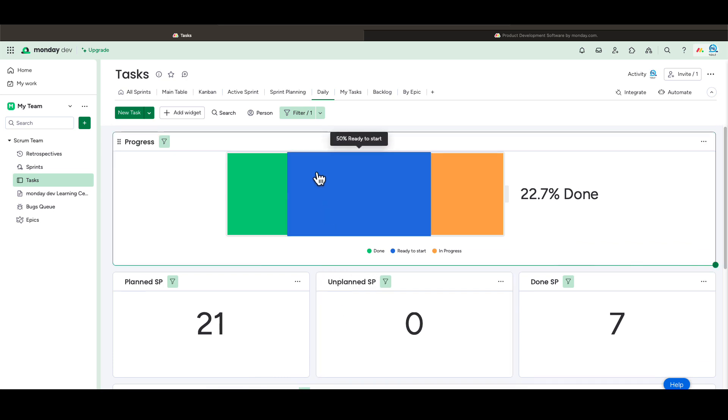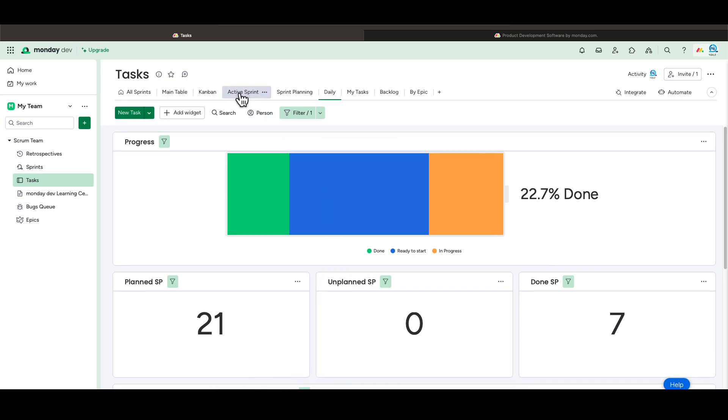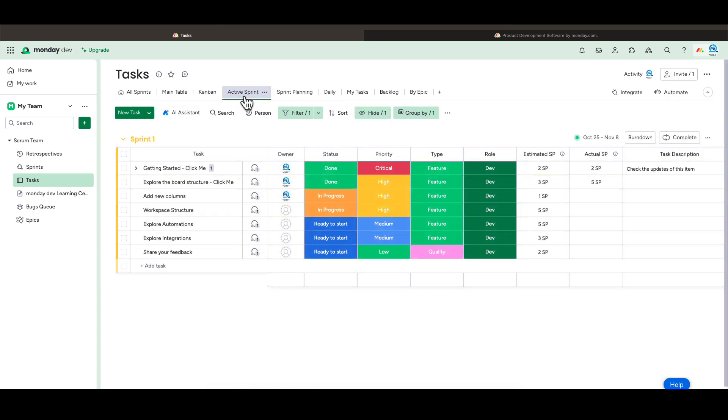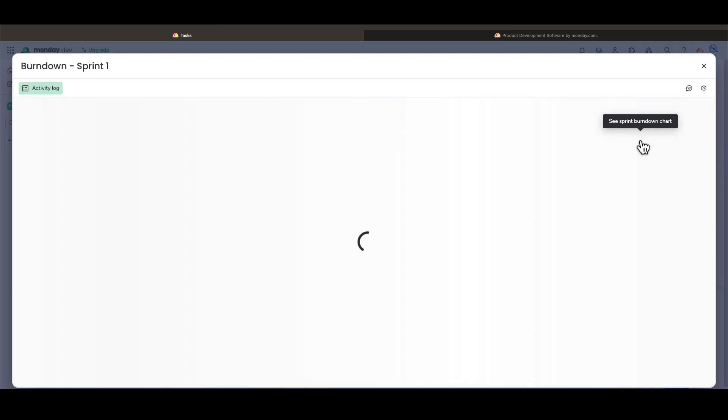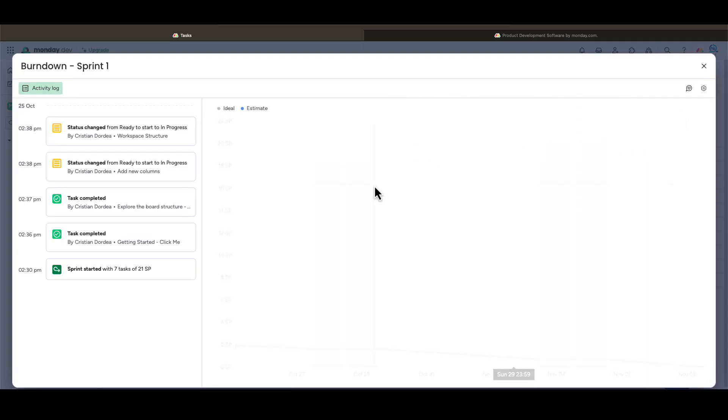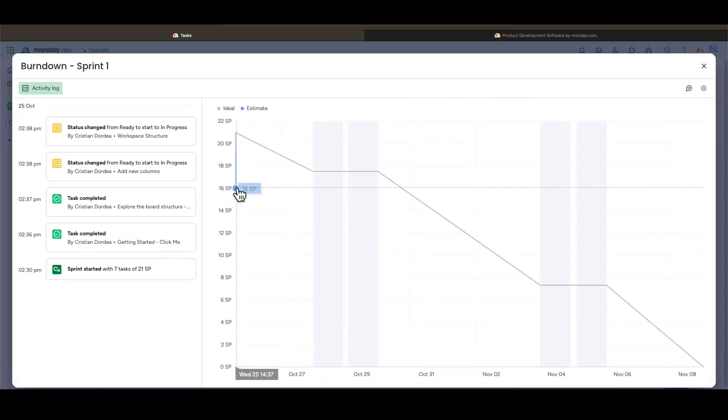Speaking about metrics, if we go back to our active sprint, we can see our burndown chart here. This will show you the amount of work that has been completed in a sprint and the total work remaining.